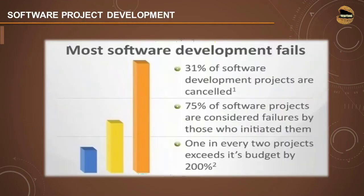Statistics show that most software development failed due to traditional approaches: 31% of software development projects are cancelled because they were not meeting customer requirements or expectations. In fact, 75% of software projects are considered failures by those who initiated them, due to poor collaboration and unclear direction. One in every two projects exceeds its budget by 200%, showing poorly planned and poorly designed execution.